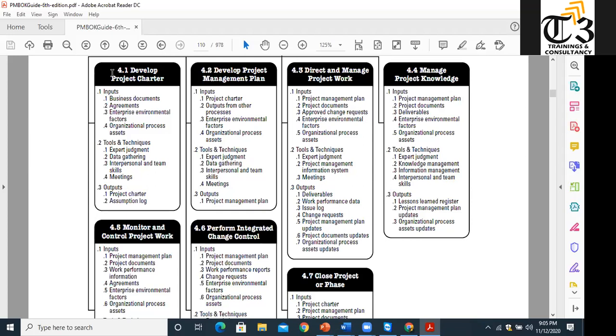So we said to start any project, I need to have a business case and benefits management plan. Business case contains the needs of the business, why you want to do the project, what is the purpose, what is the requirement, and benefits management plan contains the financial benefits, and we select the project with the least payback period and highest financial returns. Benefits management plan also includes assumptions, constraints, risk. Also, it contains the benefit owner name, and it also contains strategic alignment and the assumptions with which you are working.